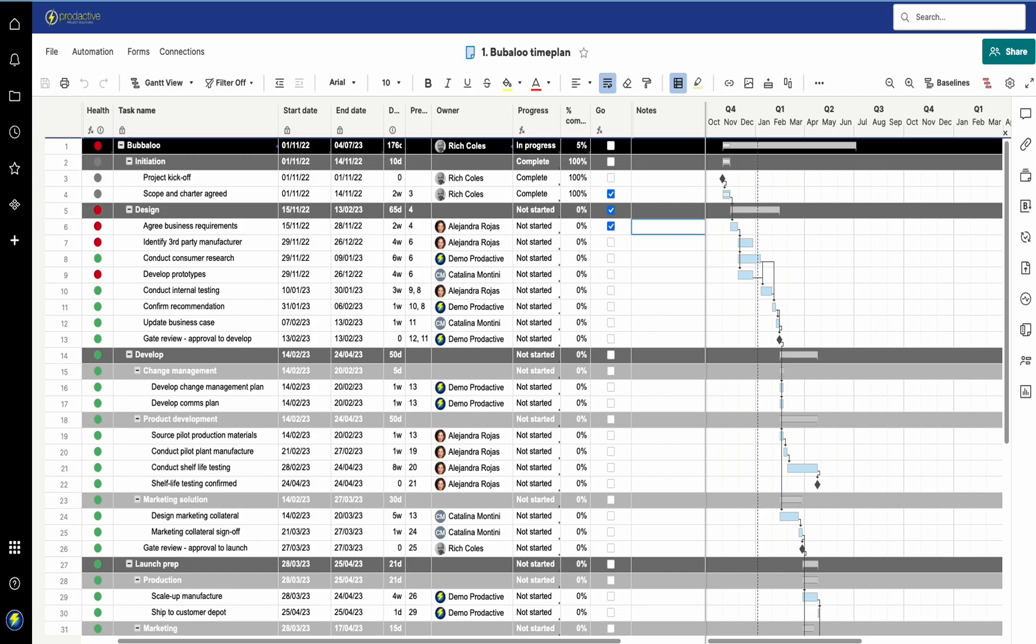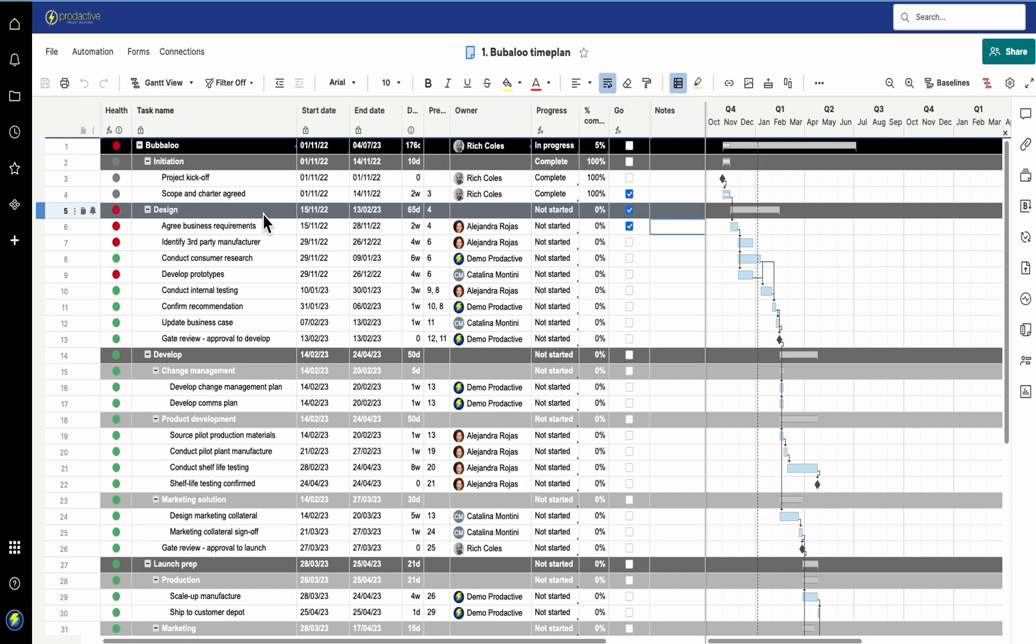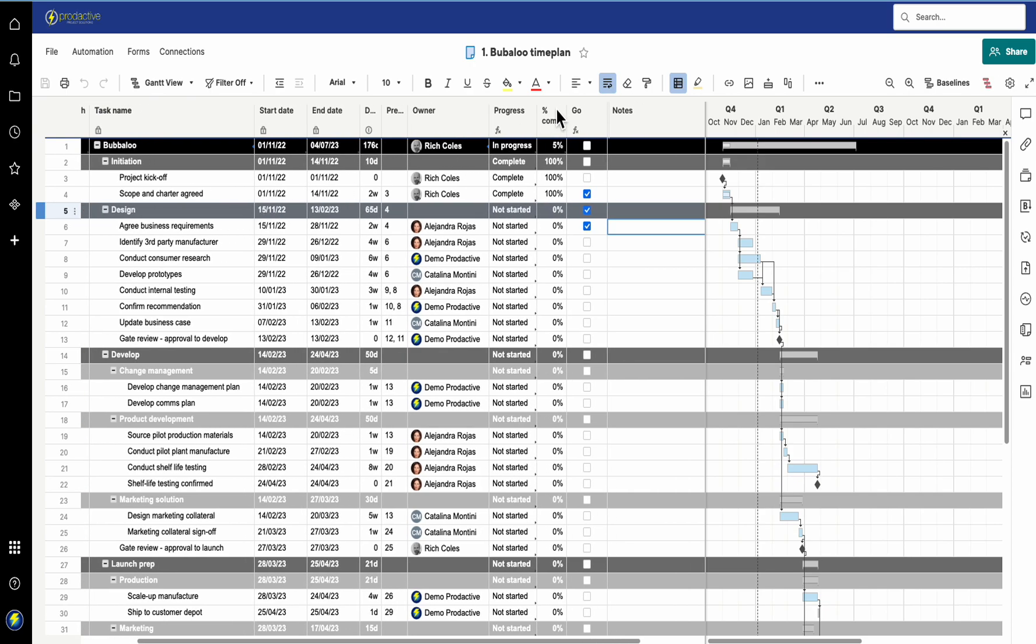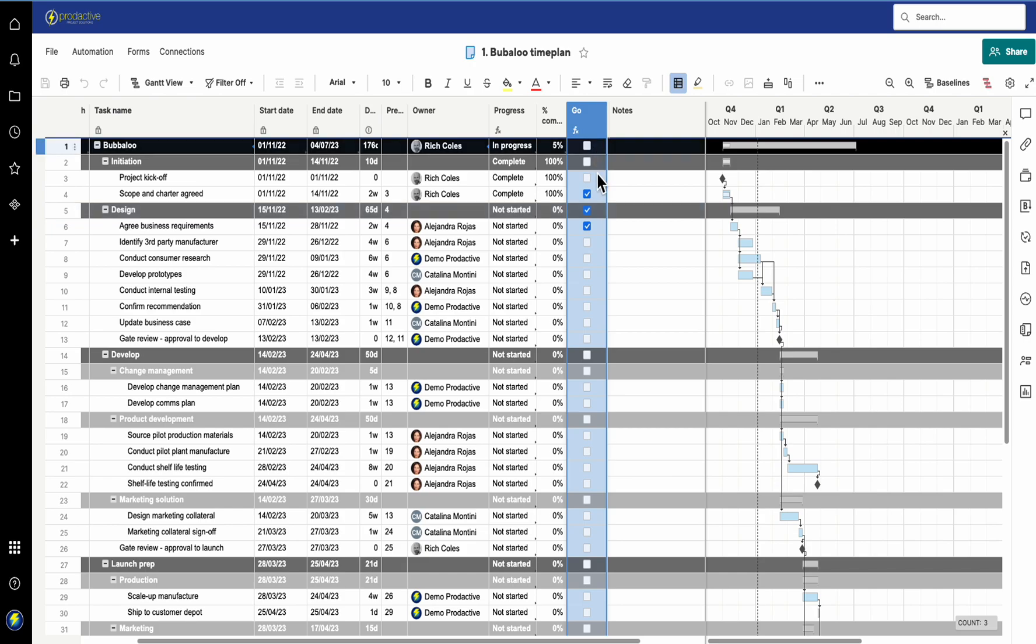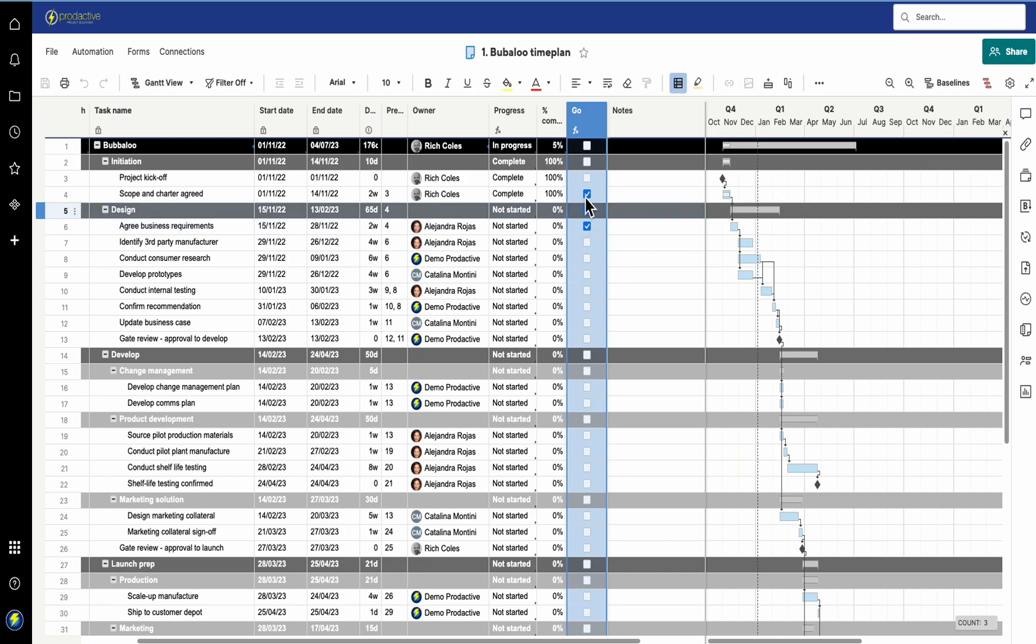Here I've got my standard time plan that I've used in lots of other videos. The key difference now is I've added this new column called "go", and that's the one which is going to trigger the alerts to say that the preceding task has been completed and it's now ready to go.